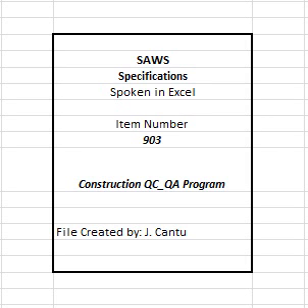6. Construction completion phase, the last follow-up, or when any segment of work is complete, the contractor is to carefully examine the work and prepare a deficiency list of anything not completed or not conforming to the contract requirements. Work yet to be accomplished could include paperwork/documentation, submittal of test results or other documents, certificates, diagrams, warranties, operation and maintenance manuals, etc.